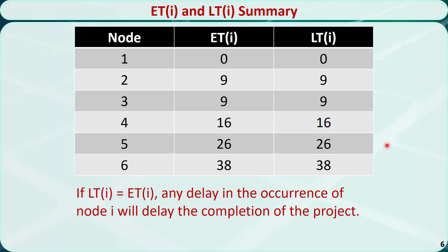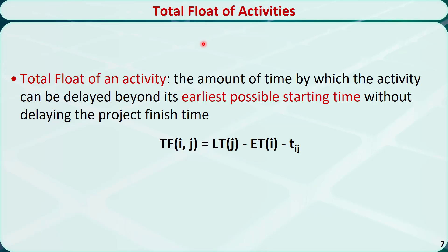Here is the summary of the early time and late time for all the nodes. We find that for each node, the early time equals the late time. That means any delay in the occurrence of node i will delay the completion of the project. Now I'll introduce another concept called total float. The total float of an activity is the amount of time by which the activity can be delayed beyond its earliest possible starting time without delaying the project finishing time. It is a measure of the scheduling flexibility of the activity. It can be calculated using this formula: the total float of activity from node i to node j equals the late time of node j minus the early time of node i minus the duration of the activity between node i and node j.